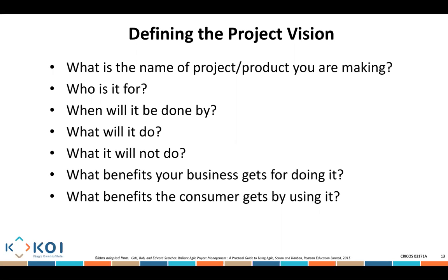Now, one thing that I've noticed in some reviews that I've done is, you need to think about the details. You want to give me a plan. I've said it before. You cannot give me a plan if the plan doesn't, for example, incorporate people, when they're going to be working, who's going to be working. You cannot give me a budget if you haven't thought about how much the Scrum Master will get, how much the Agile developer will get, how much the product analyst or product owner will get, because all of these are relevant.